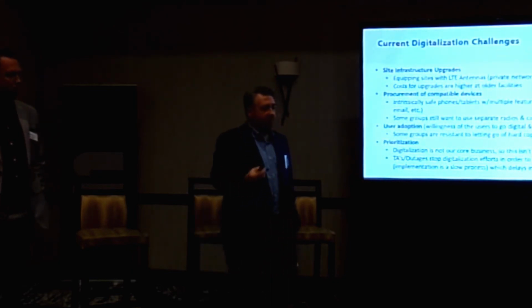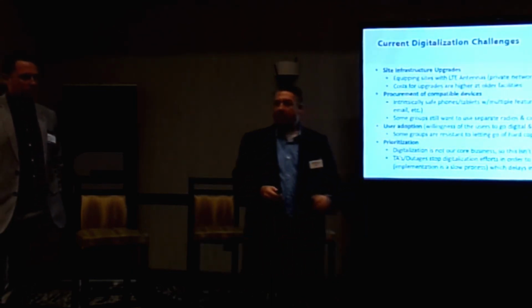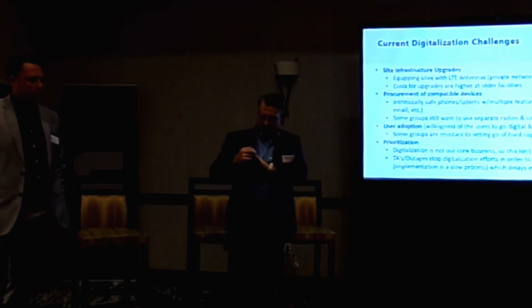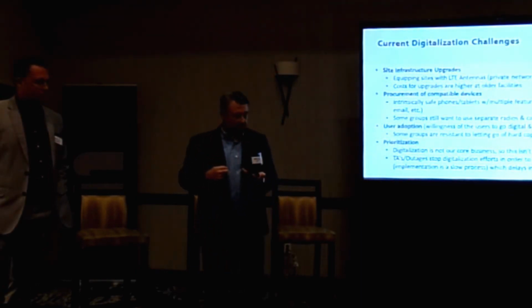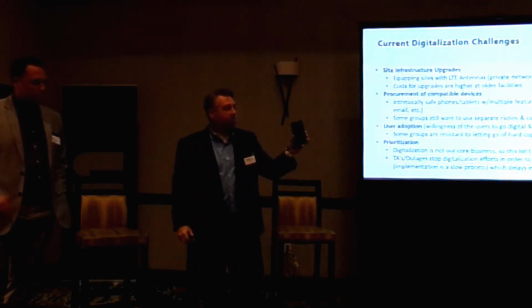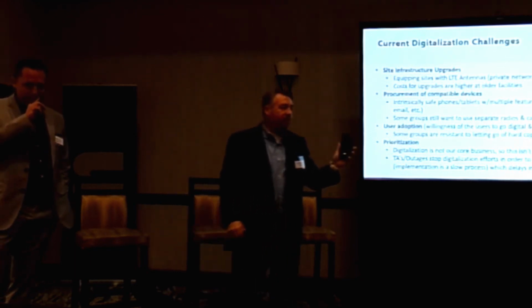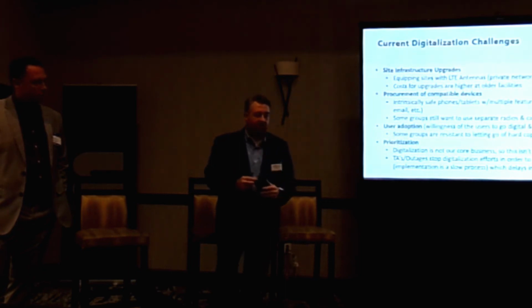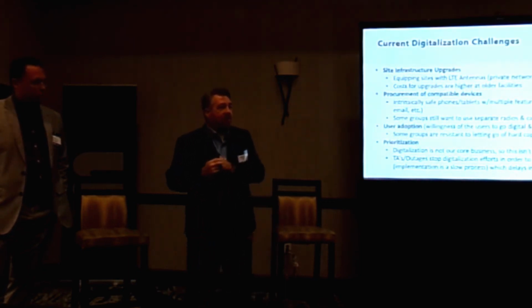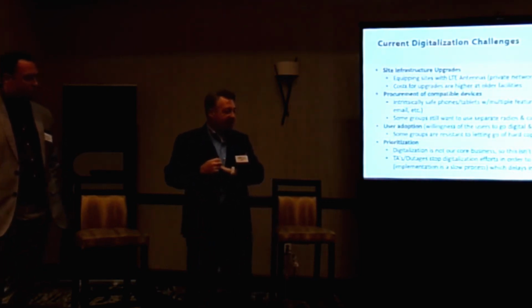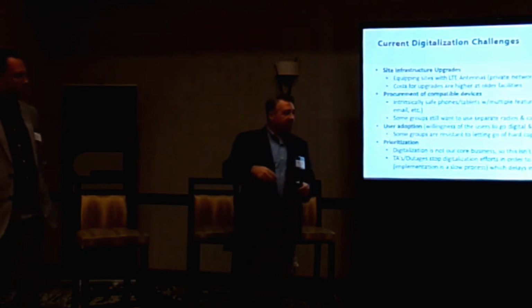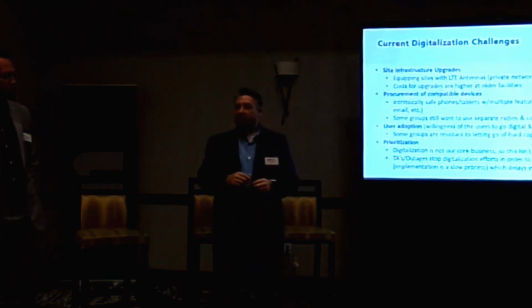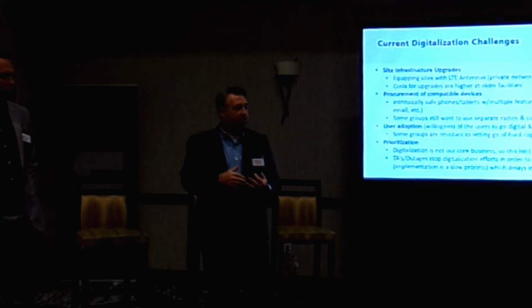Pretty much every single one of our facilities that we go in, you need to have Class 1, Div 1 type equipment to use, right? So our construction projects will buy these intrinsically safe phones without a problem, and give them to anybody that needs them, or tablets. The turnarounds are a little more hesitant in procuring the phones and the tablets. It's hard to find them to rent sometimes, and they don't want to pay for them.